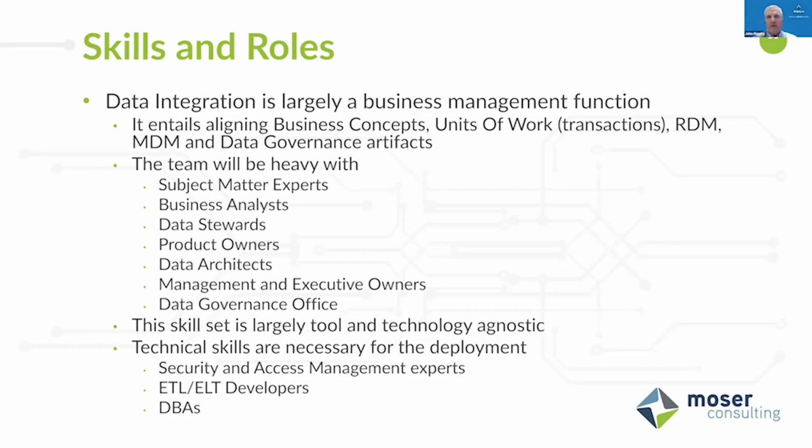And data stewards break the ties. If I have a Cerner person in the room and an Epic person in the room and it comes up, what value do I want in my core warehouse? They're going to fight about it until the project dies. I've had projects die because of terminology and definitions and data types, where there was no mechanism to resolve conflict. So it just got ugly and everybody said, yeah, we'll try again later. The data steward breaks those ties. They own the output of the data. They own the data capability, or at least the definition of the data capability, right? Product owners group all these data stewards together and say, here's what I need to do. And they're on the hook for making sure it gets done.